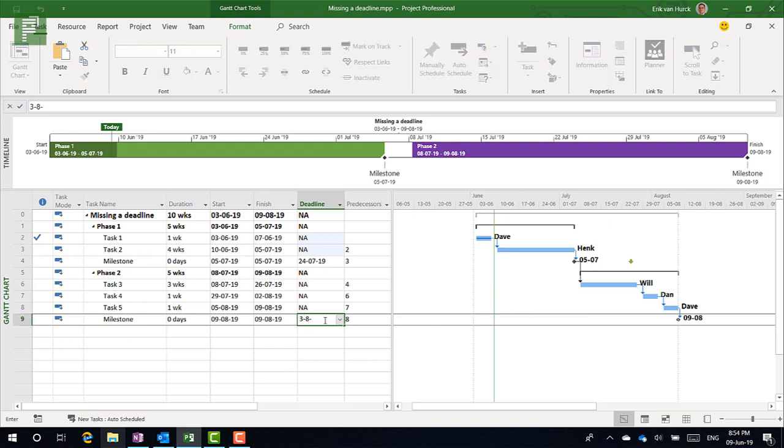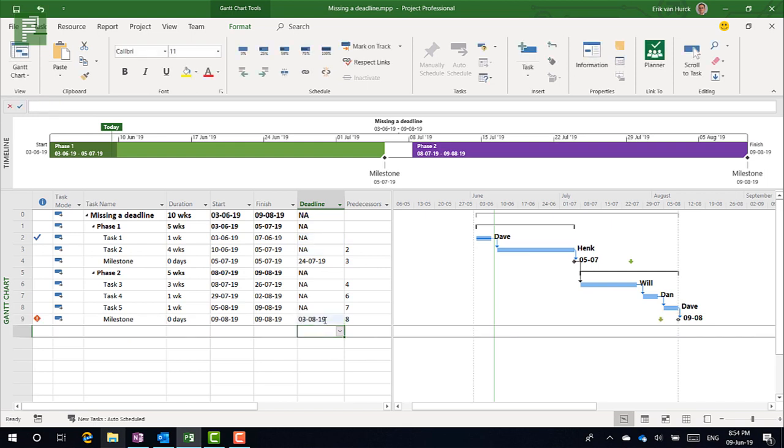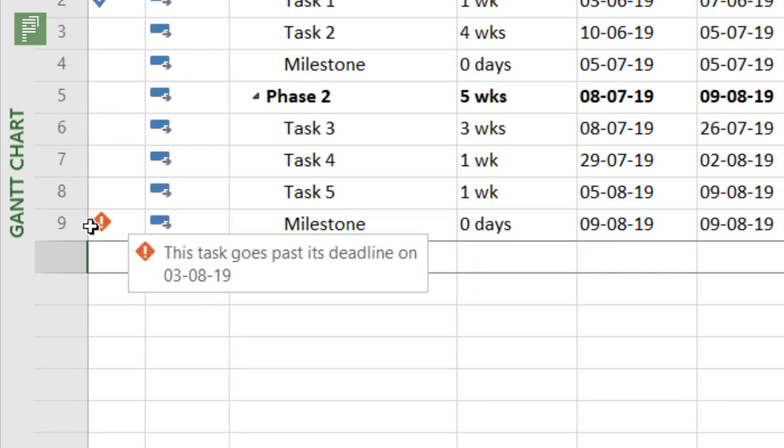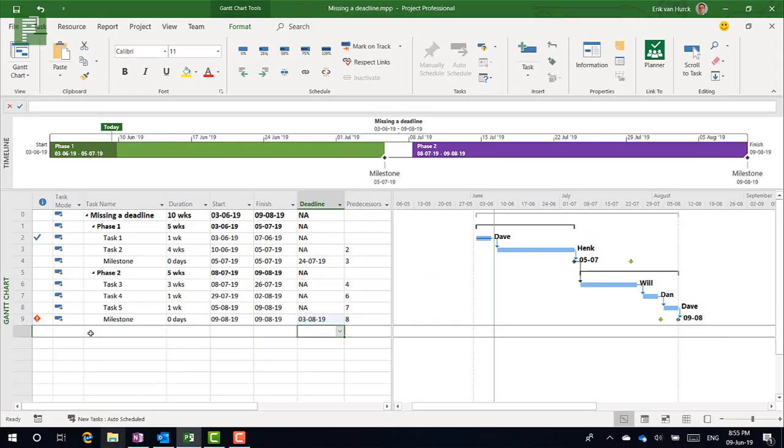Did everyone see that? I clicked on the deadline - it is earlier than the actual finish date that's currently being scheduled. And what I got here is a nice indicator: this task goes past its deadline on the 3rd of August. So that is what a milestone doesn't give you. It doesn't tell you if you are actually making a deadline. The milestone is going to tell you it is that date that something is finished, but is that a good date or isn't that a good date? We don't know based on solely a milestone - that is what we want to project. But that's what we do with the deadline.